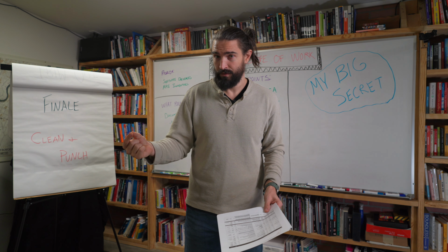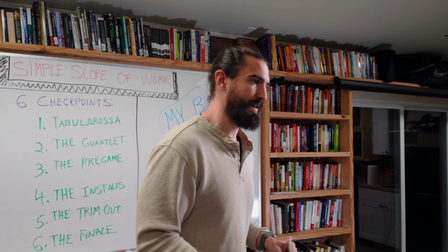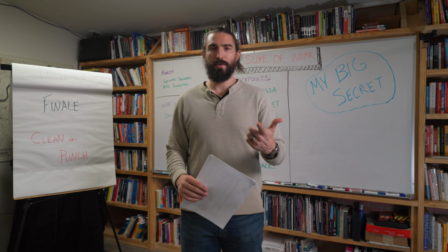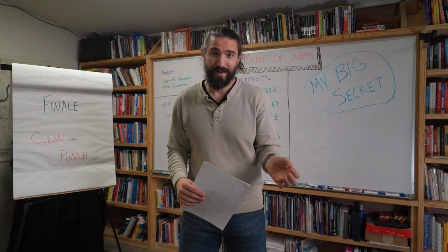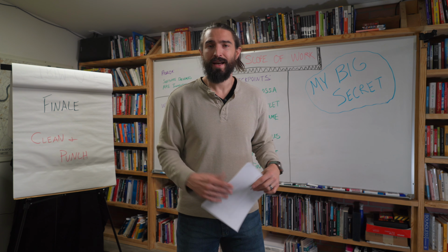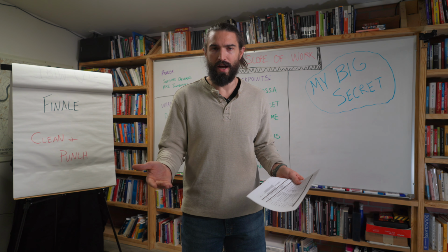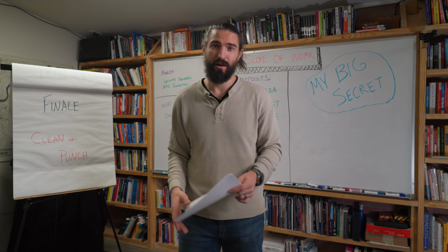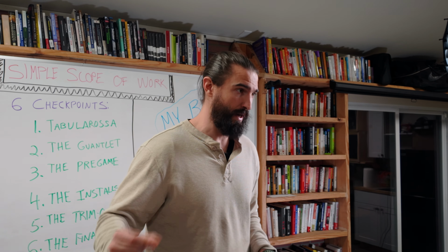People might make, let's say, 20 bucks an hour. That's not too much different from the Southeast to Colorado. Maybe a couple dollars difference, but it's not a couple thousands of dollars difference. So I always break things down to that formula. If I'm ever confused on what I think something should cost, I break it down to how long do I think it's gonna take to do it, and how much material do I think it's gonna take. And sometimes I'll ask a subcontractor, hey, how many guys do you think you're gonna have in there and for how long? Nonchalantly, of course, so they don't know that you're trying to figure out if their price is right or wrong. But I really encourage you to get used to thinking about things like that.